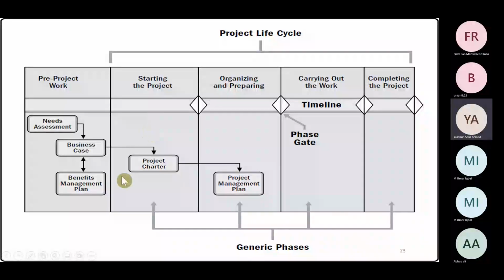The project charter is also prepared and given to the project manager, because then the project manager is authorized to use different resources on the project. He is then engaged on the project. So actual project activities will kickstart once the project charter is in place. Before that, whatever activities happen are basically categorized under the pre-project work.